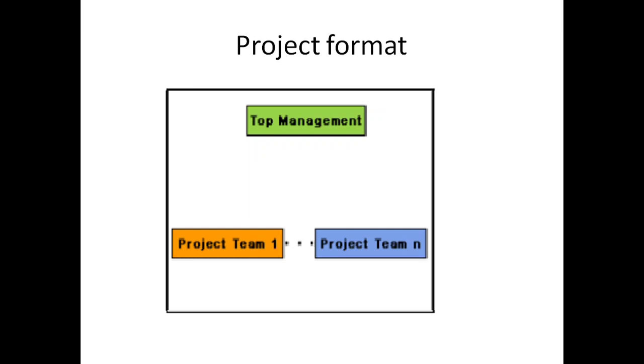So here the main problem is poor manpower utilization, because most of the time some of the people will be idle. They will not have any work to do. Maybe if there are some testers in the team, they will have to wait until the completion of the coding. So most of the time there will be idle members sitting in the project. So wastage of resources will happen in this project format.